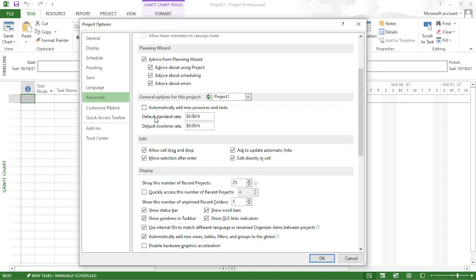You have to uncheck it, because the same person, as an example, if you assign a resource, we'll get Sampath, right? Sampath K and Sampath M. Different people are there, but unfortunately, you have typed a resource as Sampath M, who is not in the organization at all. If you tick this option, what happens? MS Project automatically creates Sampath M and assigns the work to that person. So he is not in the organization even. So it's a problem, right?